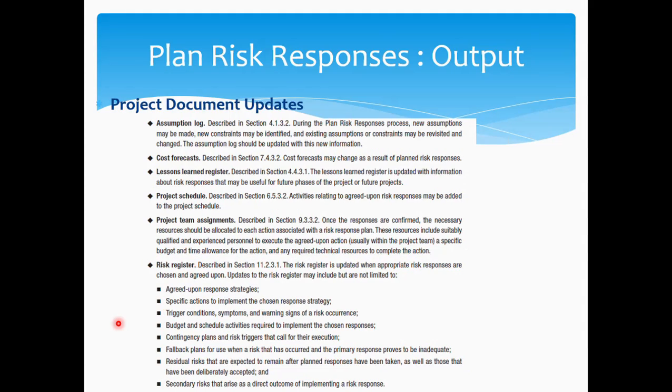As regards the project document updates, the more the updates here, definitely the more the updates on the project documents. Your assumption logs will change, as I told you, along with the risk register. Your cost forecast will change. The lessons learned register will change. Your project schedule will start changing.